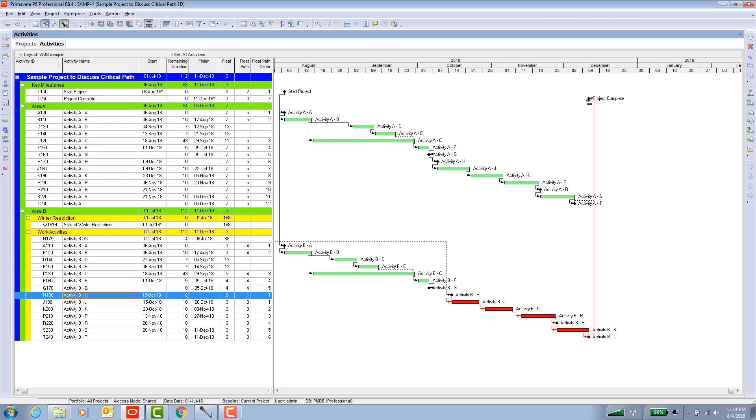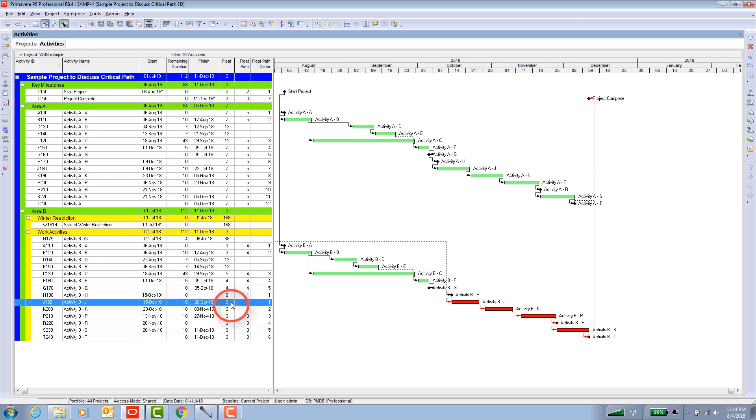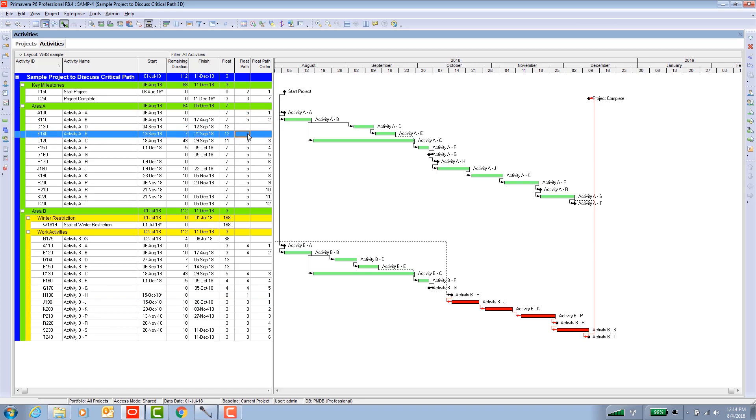So we wanted to know project completion. It's interesting you can still see the red color from the longest path function still coloring the longest path activities red. But then we need confirmation that even though there's a gap, what's the next driving one? And as you can see, up here in area A, the lowest number float path is five. And these two didn't even get a number because it would have been higher than five. And same down here, they didn't get a number.